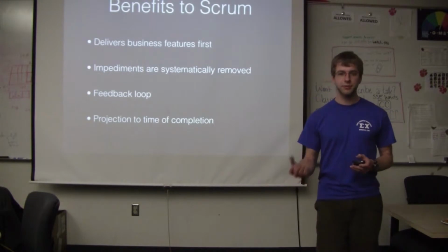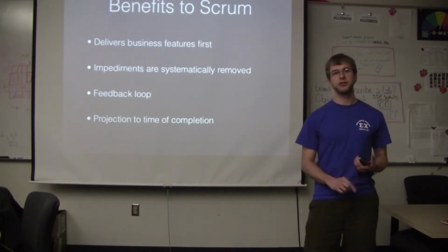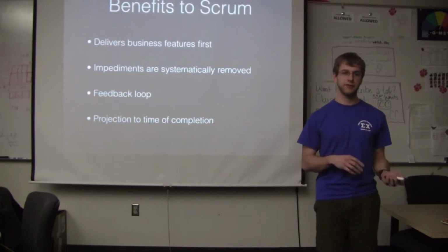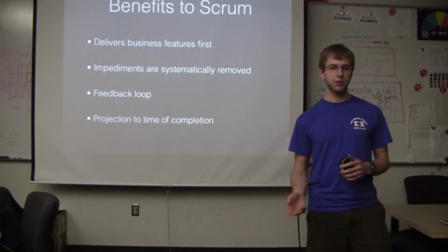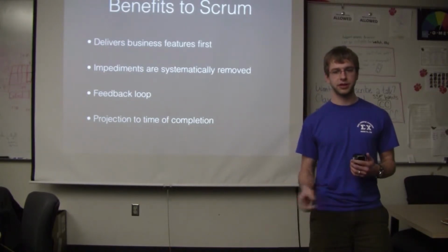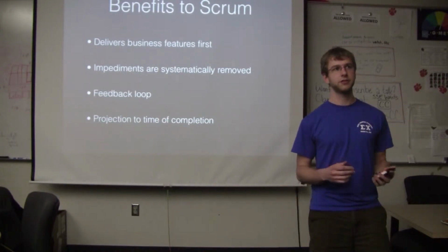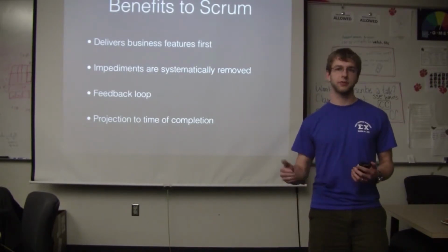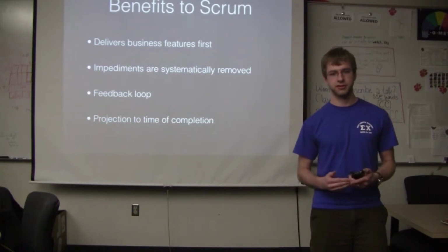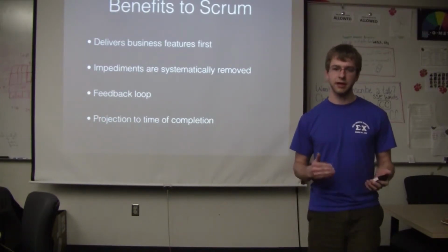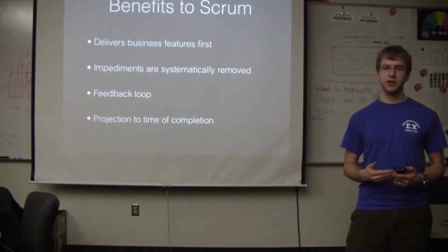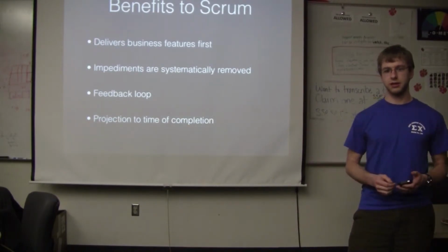Nice thing about Scrum is that it also gives you a projection of time to completion because you compute your average velocity and how quickly you're moving through sprints as well as completing tasks. You can kind of give your customer an idea as to, well, I'll have this product done in a couple of weeks, by the end of the next sprint. And it helps you stay on task as well as address if you're going to be going past the project deadline.